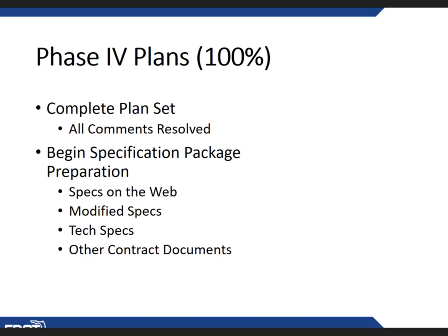So if a designer receives a commitment that's not consistent with any of the DOT handbooks or manuals, they should be asking you, the PM, to referee about this commitment. The PM should feel free to contact the appropriate central office experts, but this is not a time to add or change the pay items. It is very costly to do so for the designer, for the department.